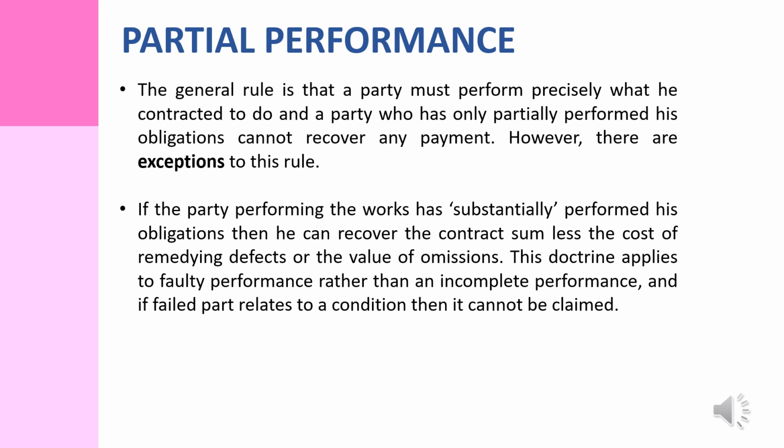If the party performing the work has substantially performed his obligations, then he can recover the contract sum less the cost of remedying defects or the value of omissions. This doctrine applies to faulty performance rather than incomplete performance, and if the failed part relates to a condition, then it cannot be claimed.